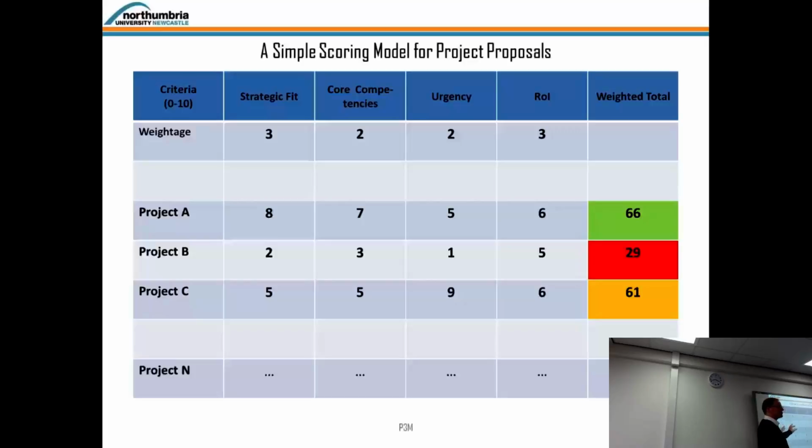We have actually something called Capita project at our university. This is kind of our model that I've stolen. Well, not stolen, I've informed, referenced it now. But the point is, we have a weightage going in at the multiplier of 3, which is quite high. This means we give it 300%. So 3 times. And it works the following: you assess your project. You say strategic fit between 1 to 10. By the way, you don't have 0, otherwise it doesn't count. The multiplication doesn't work.